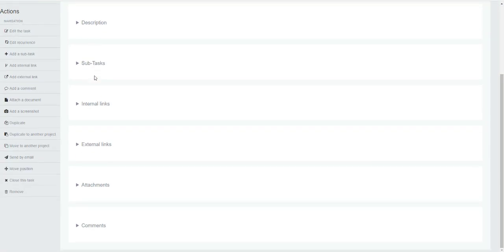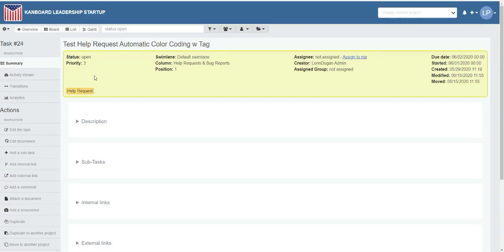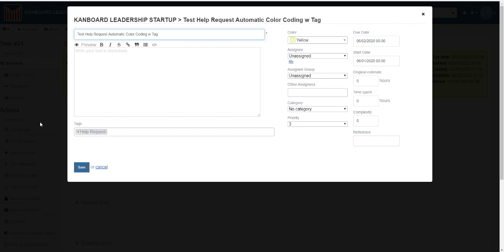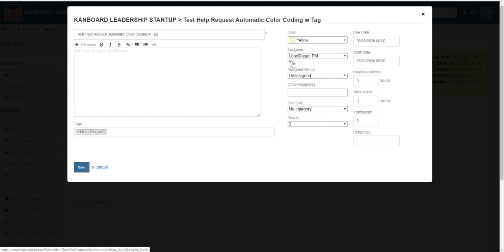When we're looking at our project, we can click different links: activity streams, we can edit the project, we can add a due date or a start date. That helps create our Gantt chart as well as order the projects by due date when we look at the specific tasks.